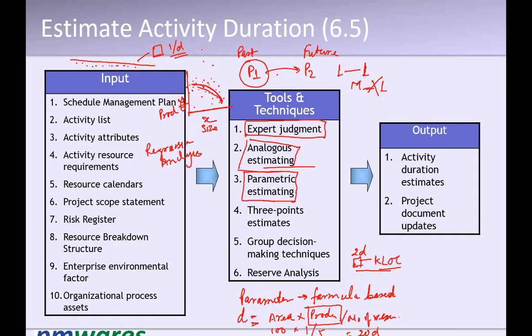Now this line's equation will come out something like productivity equals size into 3 plus 1, or 3s plus 1, or 3s squared plus 1, or minus 1, or whatever it is, right? It is decreasing, so maybe a root can come and minus 5, something like that. Now I look at my project. I see what the size of the project is. Size is the area.